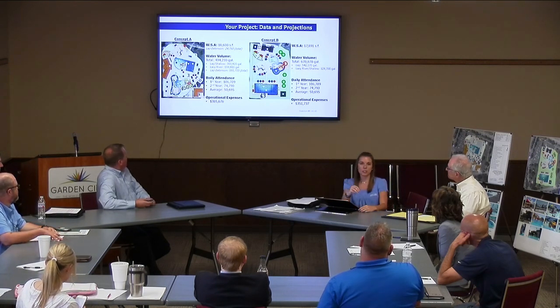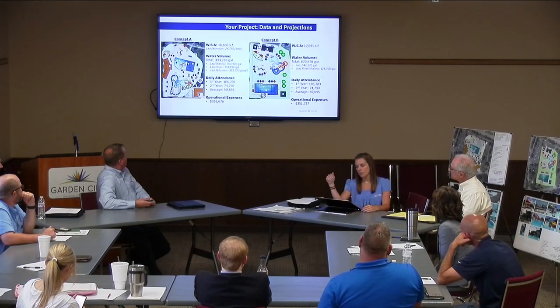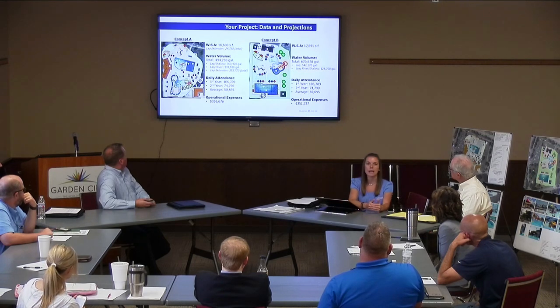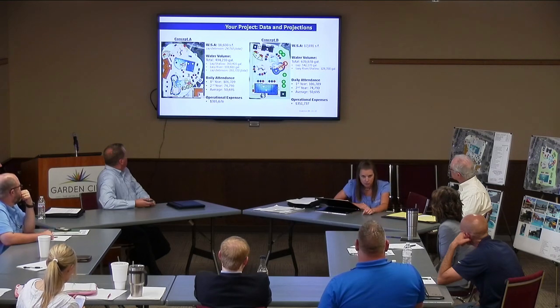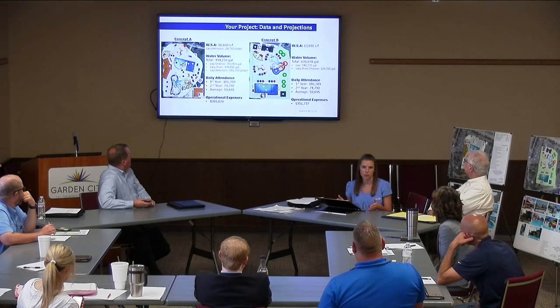So on this projection, again, this is our early level projection. When we are doing an early projection, it's taking everything into account. As we move forward and get more in depth is when we start to break out line item by line item to be able to give you that answer. Right now, we haven't done that. We haven't said, okay, in concept A, here is exactly your utilities, here is exactly your staffing. So I don't have a direct answer for you right now because the projections that we're showing on the expenses is based off of square footage.